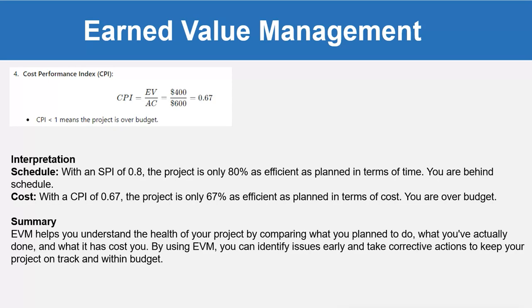Remember, with an SPI of 0.8, the project is only 80% as efficient as planned in terms of time — you are behind schedule. With a CPI of 0.67, the project is only 67% as efficient as planned in terms of cost — you are over budget. EVM helps you understand the health of your project by comparing what you planned to do, what you have actually done, and what it has cost you. By using EVM, you can identify issues early and take corrective actions to keep your project on track and within budget.